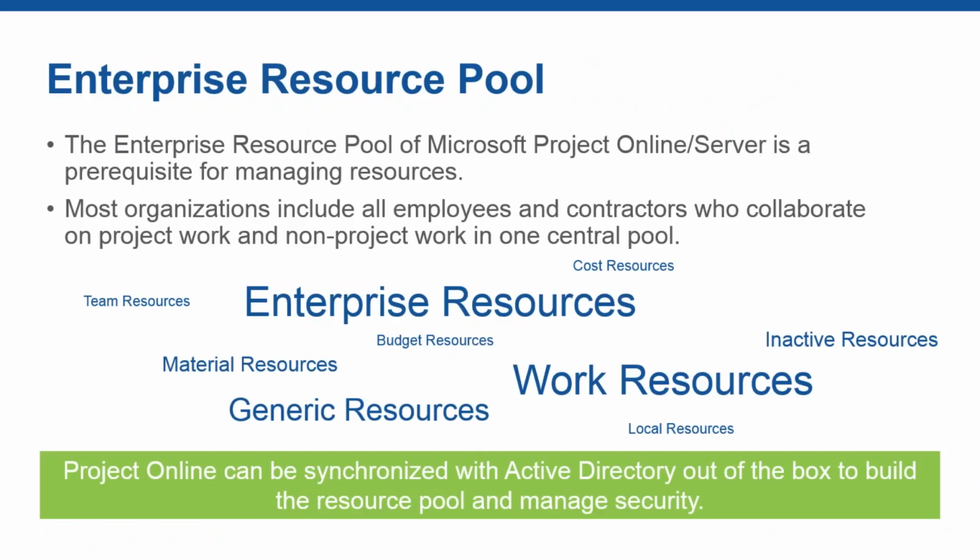That basically means if you start adding new products into this system, by default they're all connected to the resource pool, and therefore you can start collaborating, looking at the same resources, as opposed to having 5 projects or 100 projects and everybody writes down John's and Mary's name, and then you have basically duplicate resources. And that's also a key concept, as you can see in the lower half of the slide, the concept of enterprise resources.